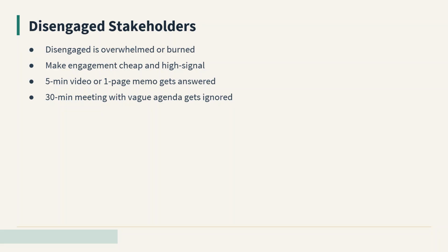Short, focused interactions with a clear ask produce better results than long meetings with vague agendas. A 5-minute video, a 1-page decision memo, or a single, well-framed question gets answered. A 30-minute meeting without a stated decision gets ignored. If getting sign-offs takes longer than the actual work, the root cause is almost always disengaged stakeholders who have not been given a compelling reason to prioritize your project.